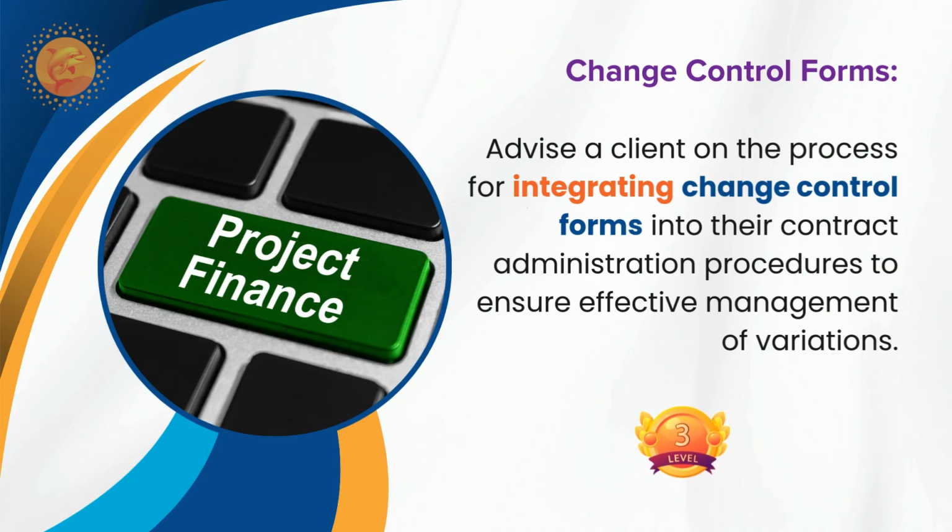Yes, the forms we can use in integrated change control. We start with the RFI, request for information. This initiates the change procedure. But after that, we issue the request for change. RFC, request for change, is issued by the contractor to the engineer.